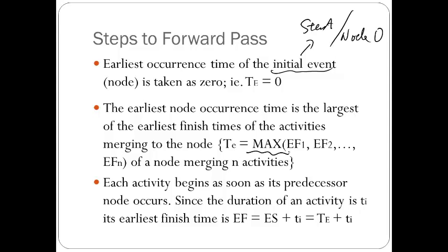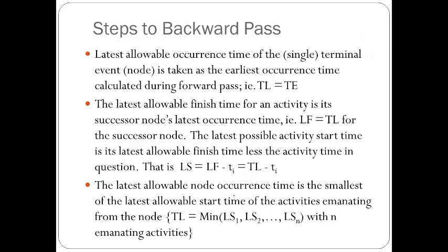Okay. And then this F cannot start until this event finishes. So the earliest start time for this event is 20. Then that means F's earliest start time is 20. So this number will translate to here. Each activity's earliest finish time is pretty easy now. Like this one, the earliest finish time is basically when you can start plus how long it takes to finish that activity. Then we add 2 here. 23.